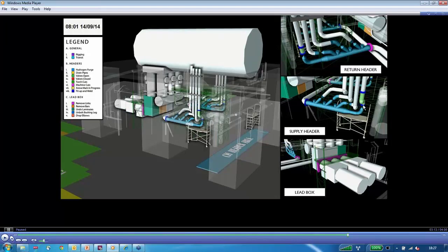If you look here and here at the 14-inch and this outer 8-inch, that was our real target for success. Not whether we did it in 72 hours, but for success was if we could get this in place with it welded and this in place and welded, and then we knew we were going to be okay throughout the rest of the outage. That was our core bit of work, to get this bigger section out and back in. And then it would be easier to find windows of time to come in and work. But the time to do the primary in and out sequence is where we really struggled during the prior outage.